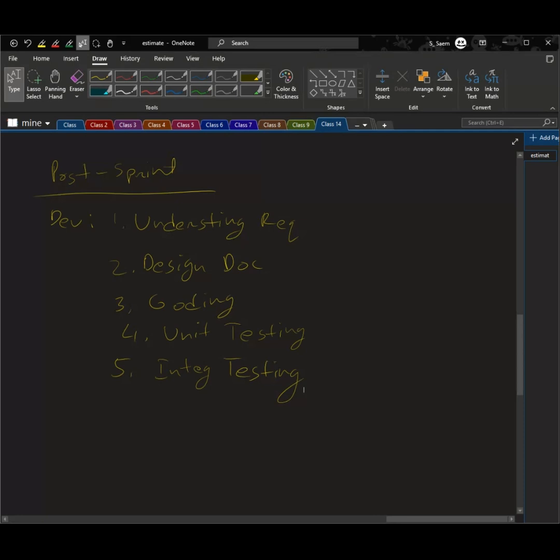So you can create subtasks for larger user stories to break them into actionable tasks. For example, for login functionality, create login form, add input validation for email or password, handle invalid credential errors, perform usability testing. Okay, so we will stop here for today.